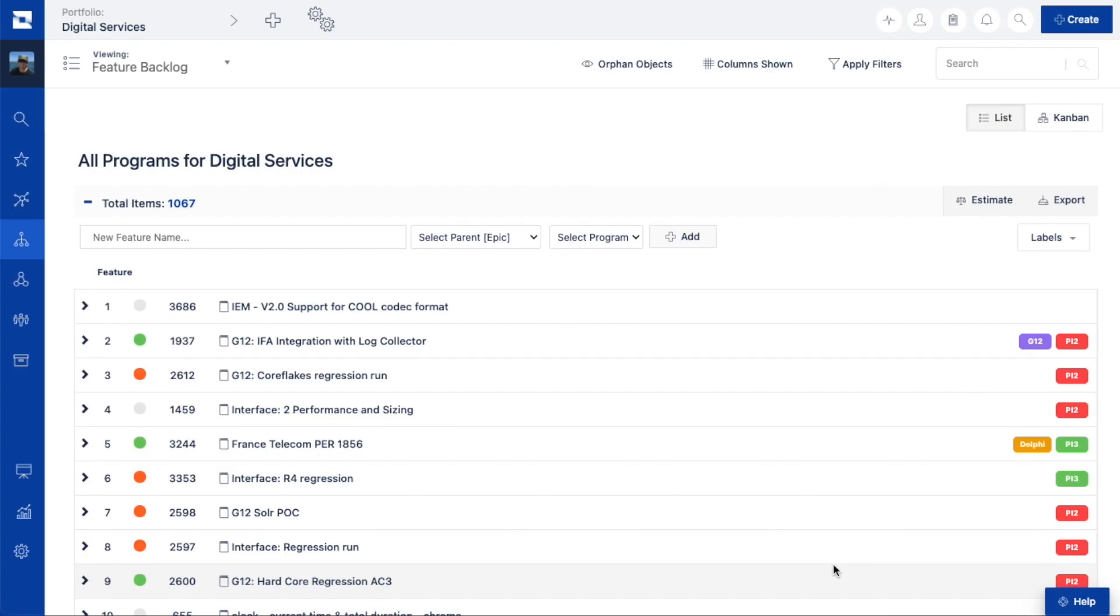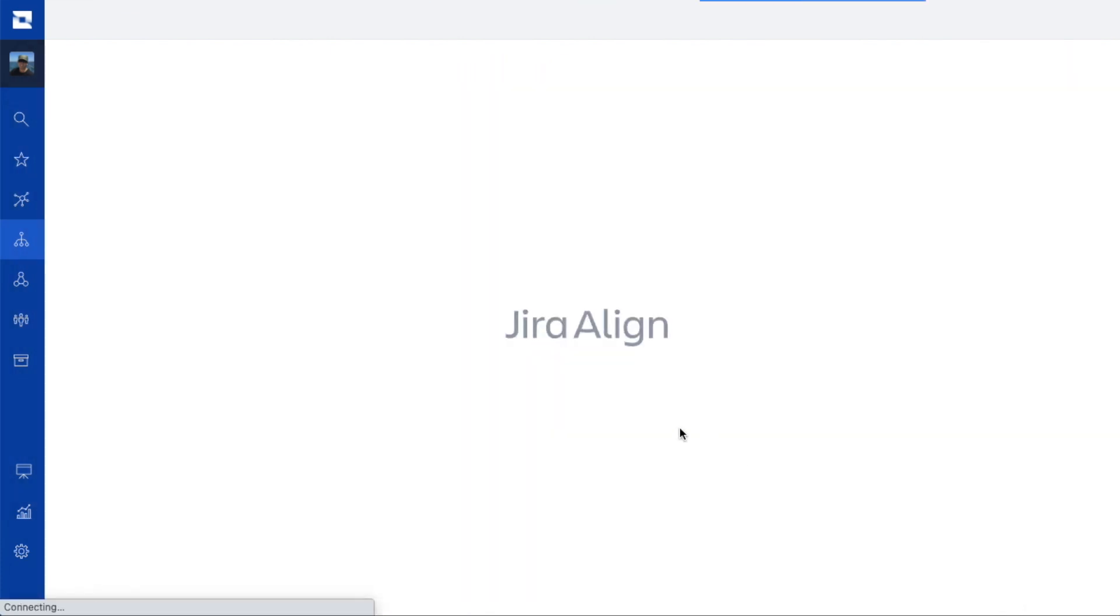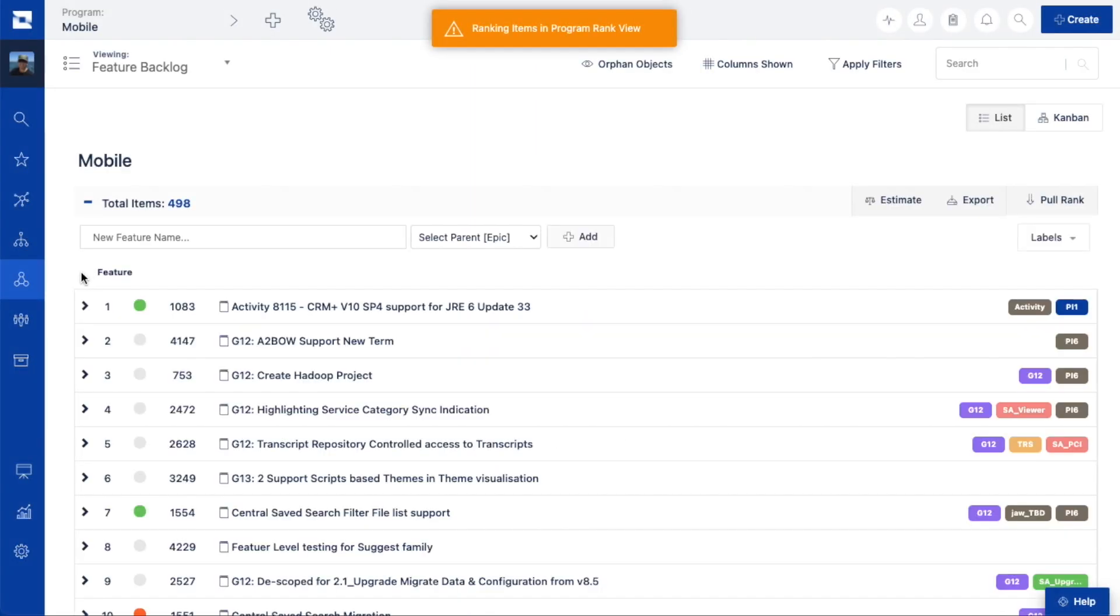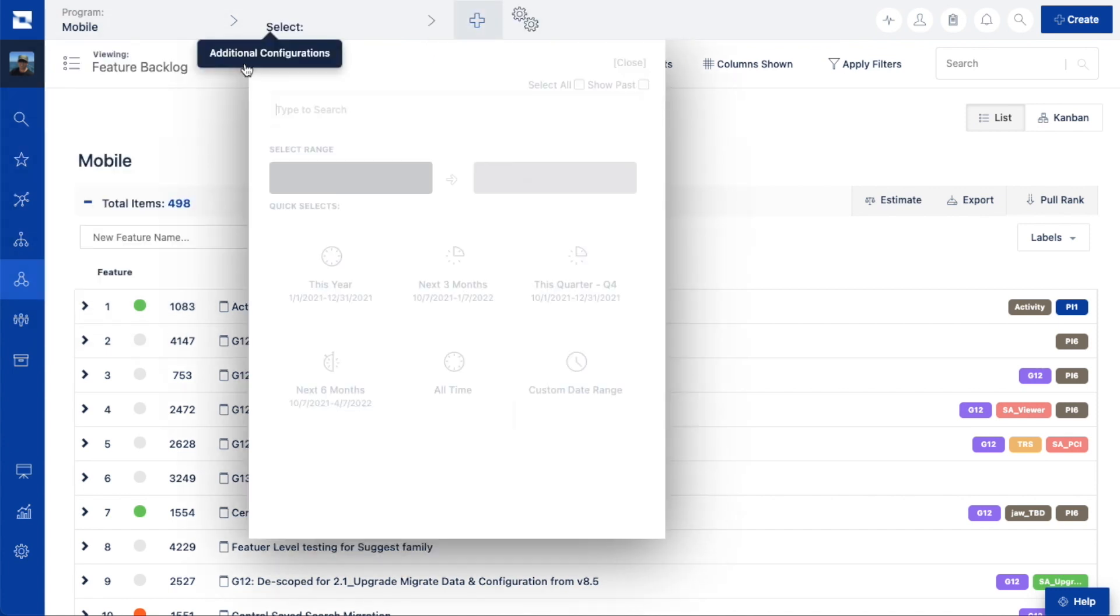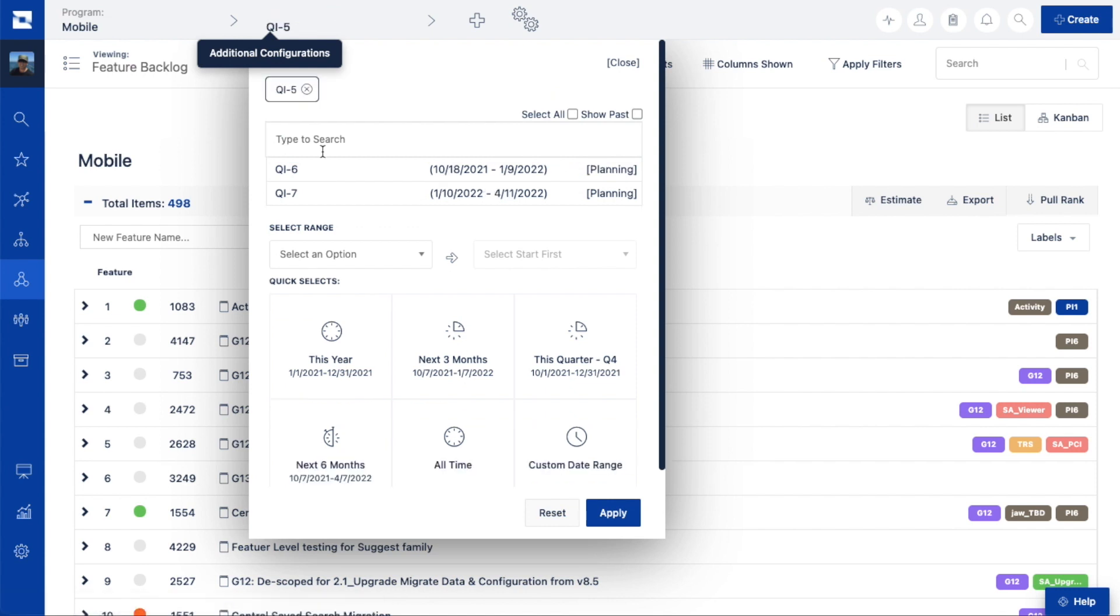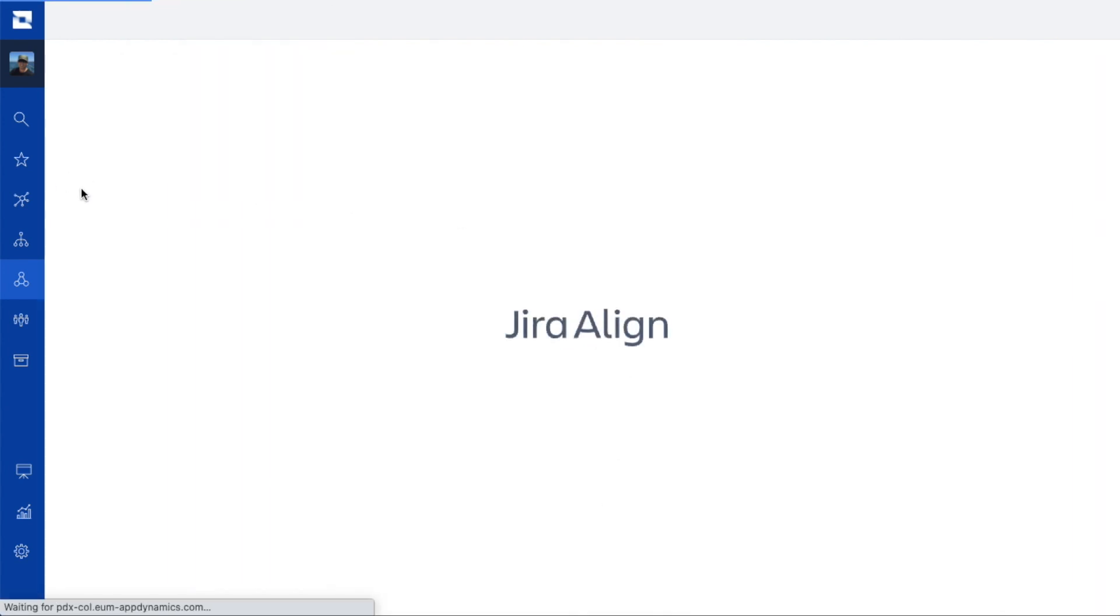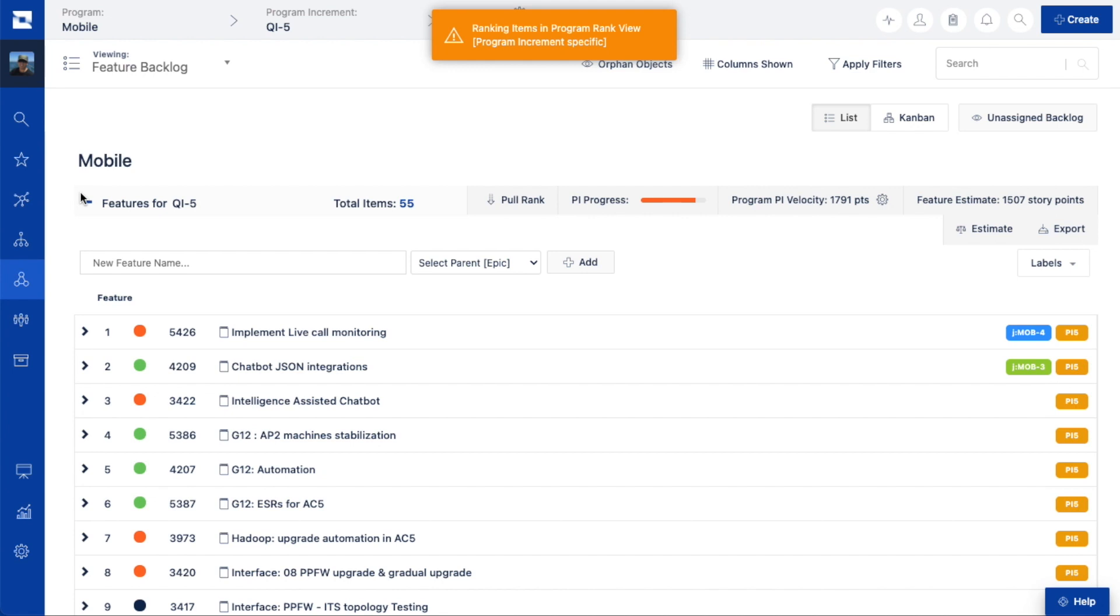As you look to target work for a planning period, such as a quarter or program increment, you can encourage decentralized decision-making by allowing programs to locally prioritize the backlog. This means there can be a global priority of work set by leadership and then a local priority that can be applied by programs and teams so that they can account for things like capacity, key milestones, and market commitments.